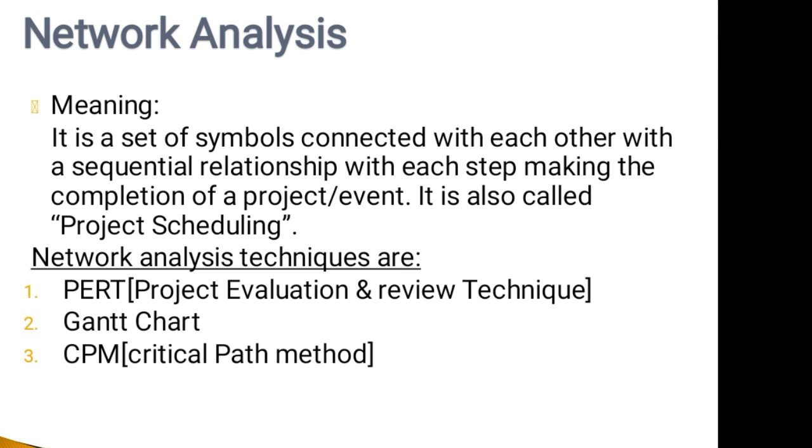In network analysis, there is symbolic representation of different activities, and that's why it shows the interrelationship between two activities, which one is the pre-activity and which one is the post-activity. Say, for example, in producing cargo jeans, ordering the raw material is the pre-activity, and weaving is the post-activity.